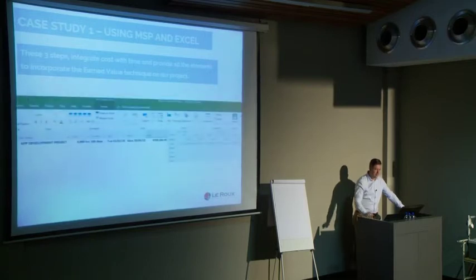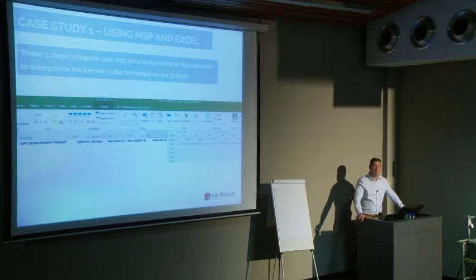And the next step is that I simply extract my earned value metrics from it by using the task view of MS Project. If you guys want to, at the end, I can quickly show you in MS Project. I've got it on the computer. If you have any doubts on where to get that, it's just a view. And the task usage view, you can write it down because that's your friend in MS Project. That's where all the juicy information lies. And there we have the planned values. Can you see?